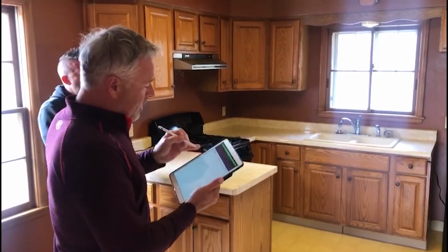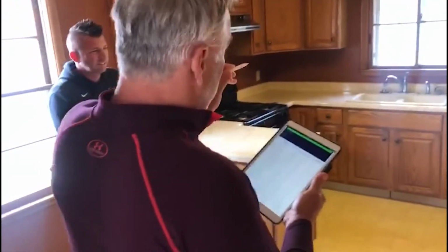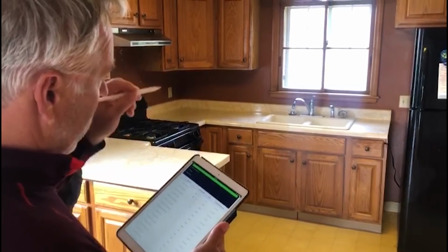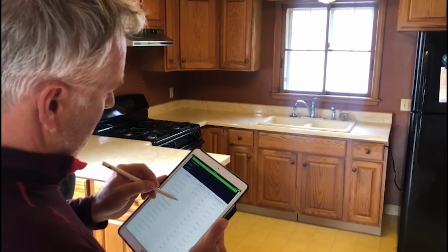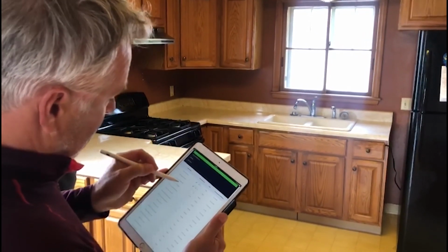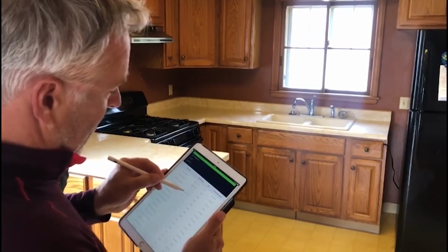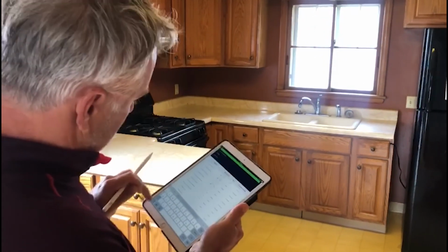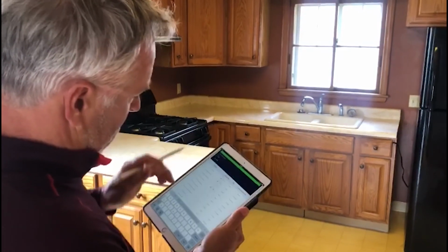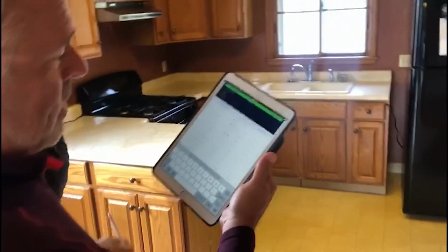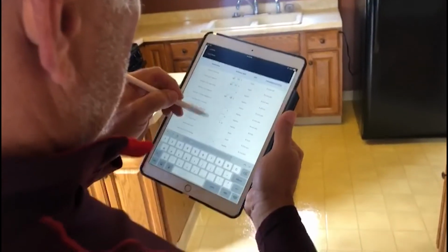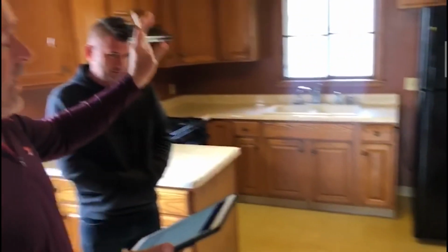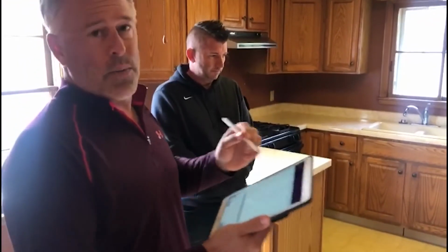For the kitchen, this is going to be interesting because we're only doing countertops, for the sake of not going back into the system to calculate counters. We'll do a median kitchen, but we're going to take this number and just reduce it by 50% because we're not replacing cabinets. That'll be best, since we're not going to tear everything out. We're just going to do the countertops. That's the fastest way to get it done in REP.